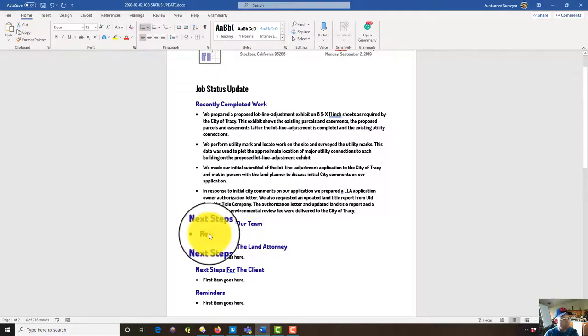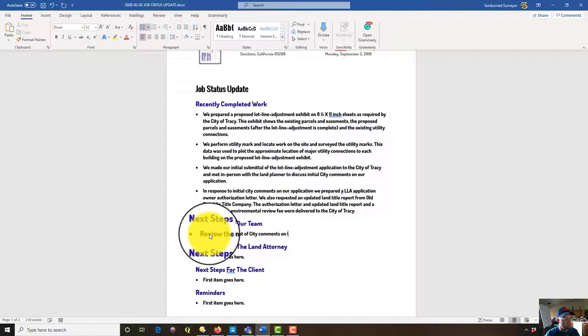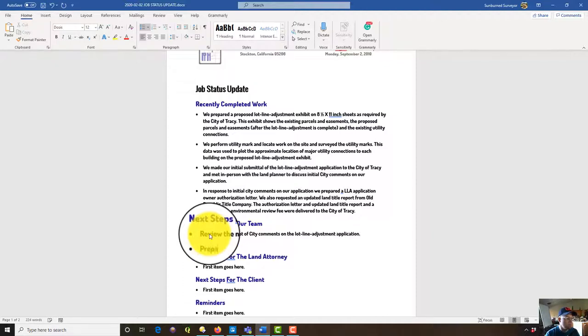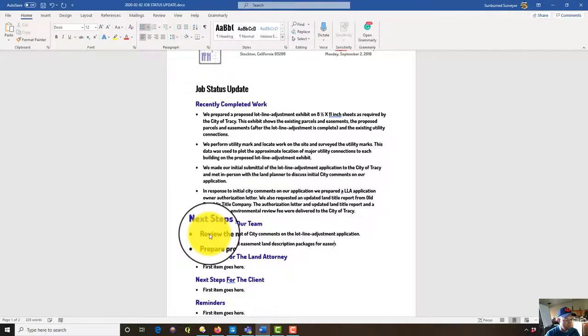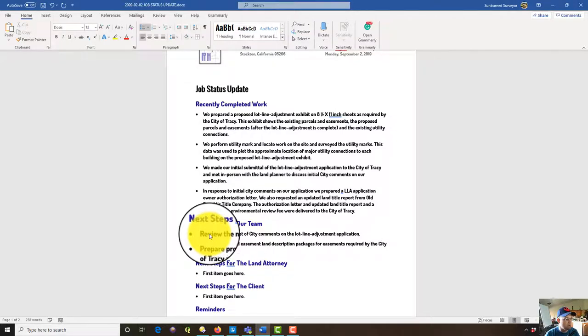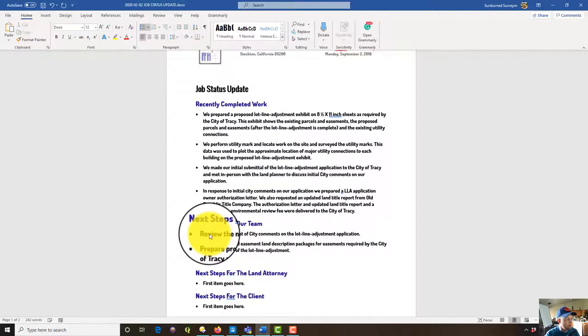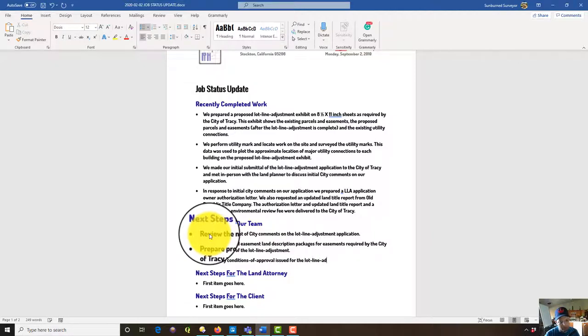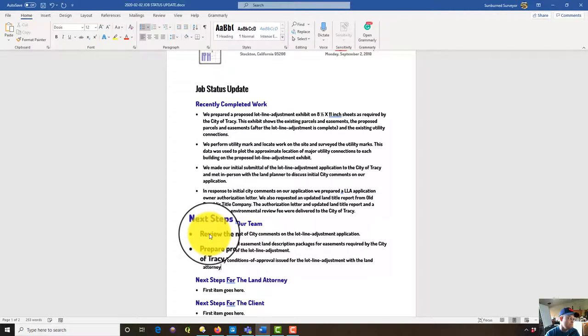So that's what we've done on the project basically in the month of January. So next steps for our team will be to review the next set of city comments on the lotline adjustment application, prepare proposed easement plan description packages for easements required by the city of Tracy as part of the block line adjustment, review any conditions of approval issued for the lotline adjustment with the land attorney.